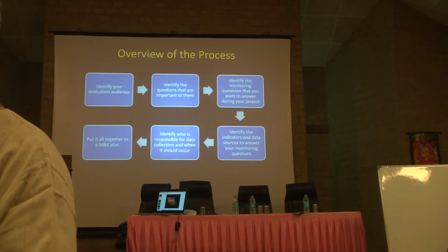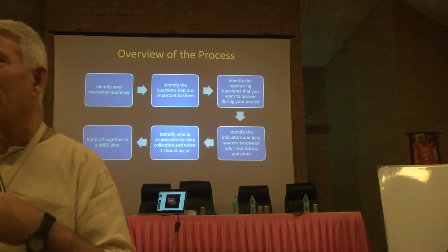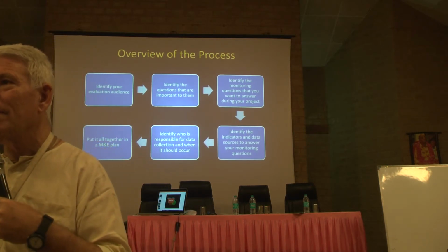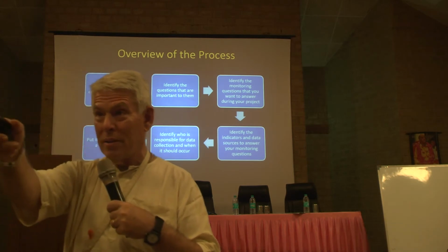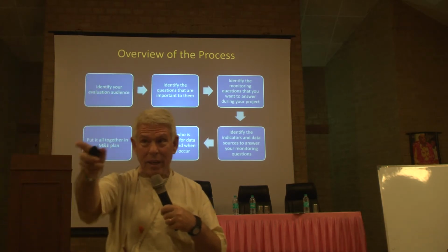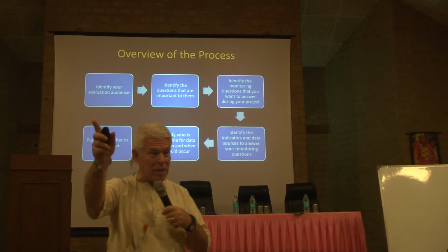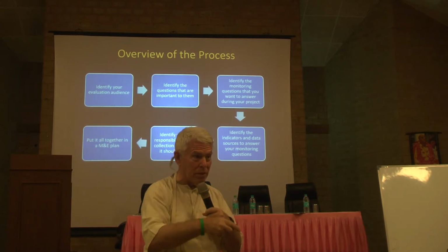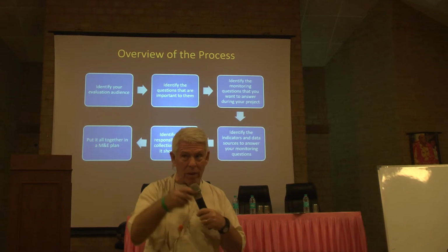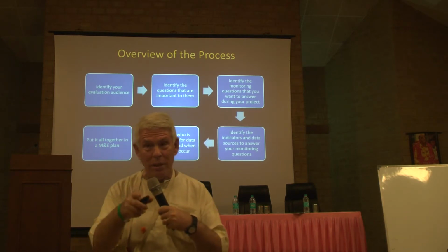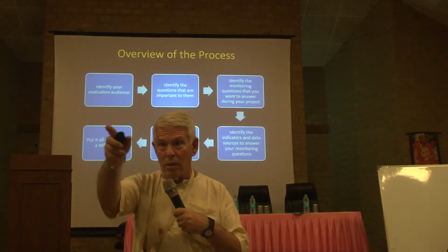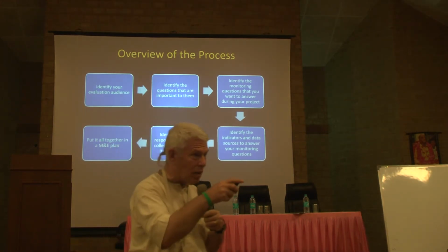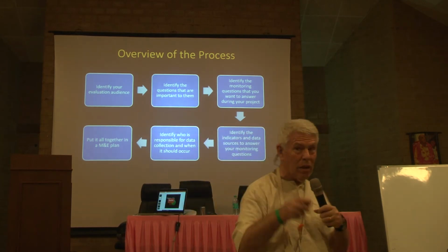Hare Krishna. For example, when we consider Food for Life or a hunger management program, we can show the body weight improving. That's a good one. Nutritional value of the food. That's a real indicator. Note the difference between that and the number of plates distributed. The number of plates distributed is only an indicator of the activity, not of the result. Weight gain in the target audience is an indicator of a result.